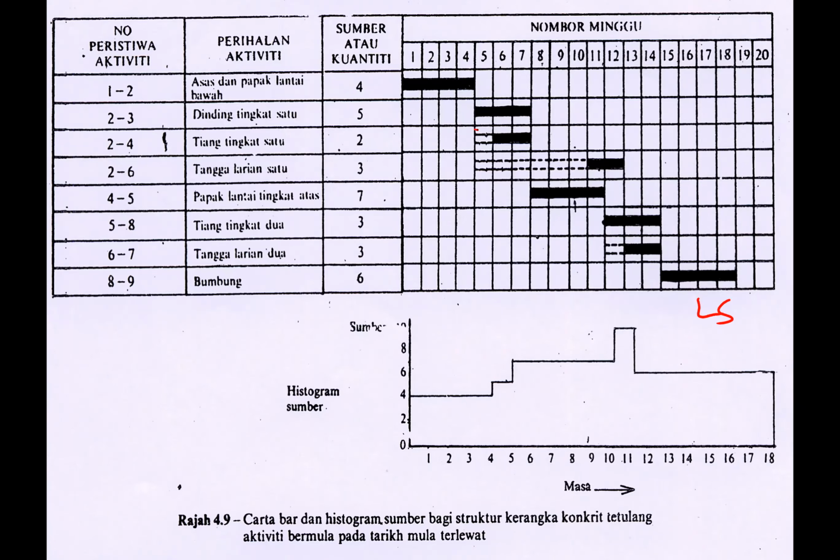The difference is basically here. You notice the total float is what we put at the beginning of the project activity, where we push this one to late start date, and this one is also late start date. And then you see, we do have a different histogram graph.